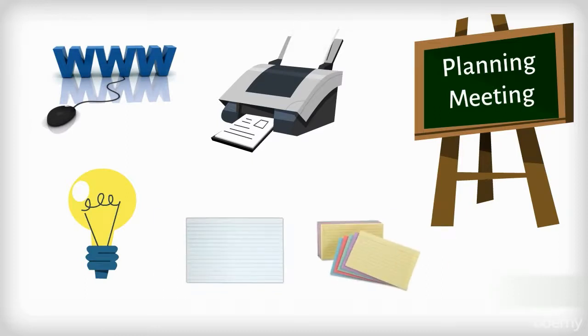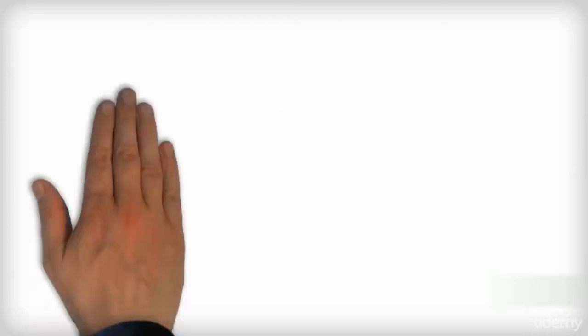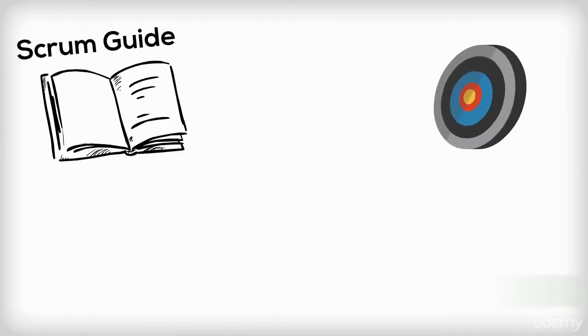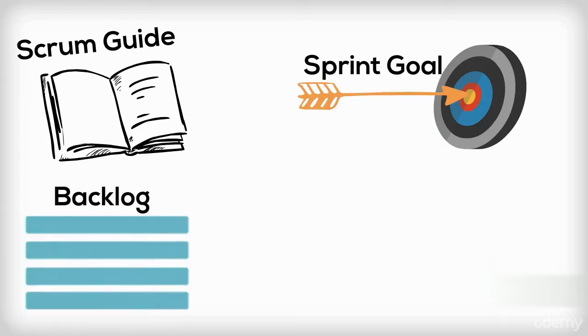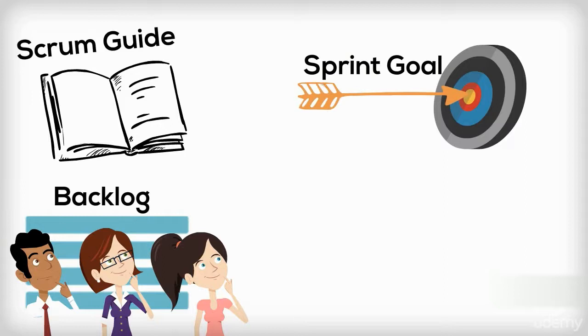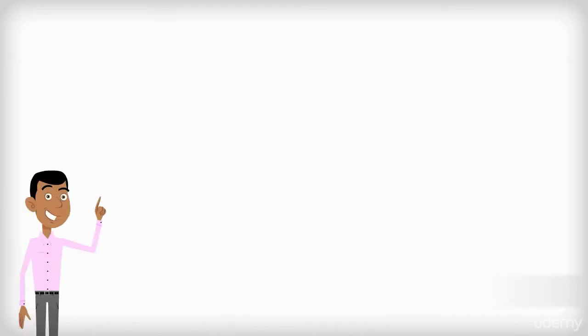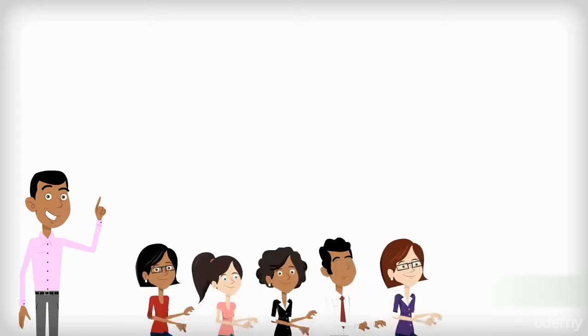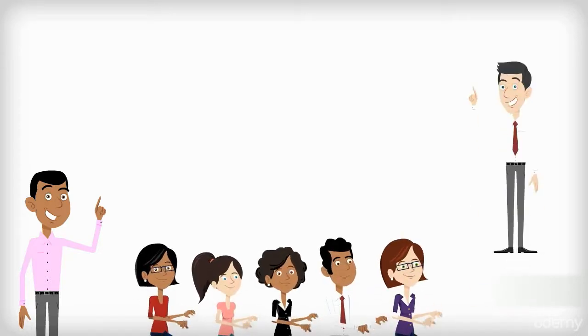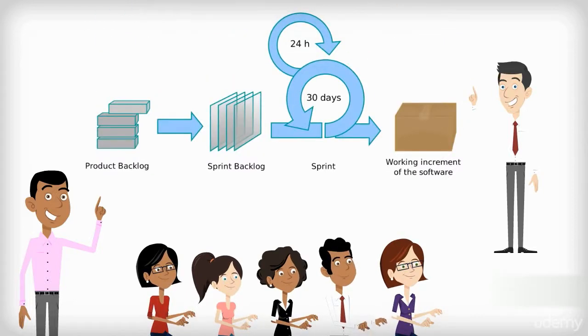Sprint goal. The Scrum Guide states that the sprint goal is crafted from the items in the sprint backlog once they have been selected. It gives the team wiggle room if they run into any unforeseen problems completing the work while still meeting the overall vision of the product owner. I have mentioned this upfront because in my experience it also helps focus the team to have the product owner describe upfront what he would like to achieve by the end of the sprint. This does not force the team to commit to it, but it does help them to move in the right direction.